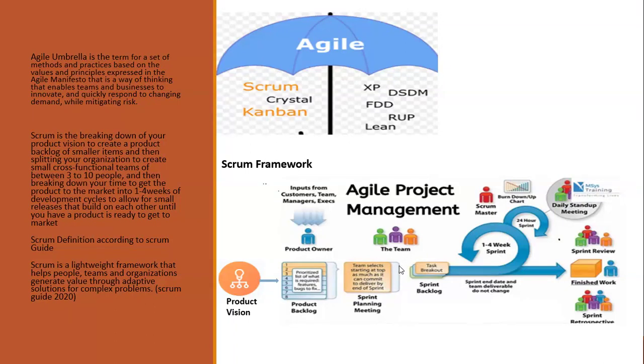So I want to show you something else here in case you're writing PSM1. Now, the sprint backlog belongs to people they call developers. It belongs to developers only. And another thing, daily scrum. The only people that are supposed to attend daily scrum are developers, right? So the meeting belongs to them.